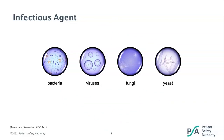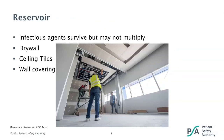Which pathogens to be most concerned with will depend on your construction and renovation project. The next link is the reservoir — this is where the infectious agent can survive, but may or may not multiply. Commonly, we think of reservoirs as humans, animals, or the environment. During construction, we are most concerned with the environment. Examples of this would be drywall, ceiling tiles, and wall covering. During demolition, a lot of dust can be stirred up and organisms being harbored underneath or in debris can be circulated.